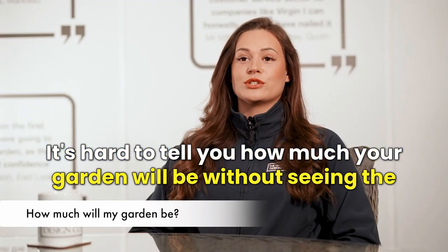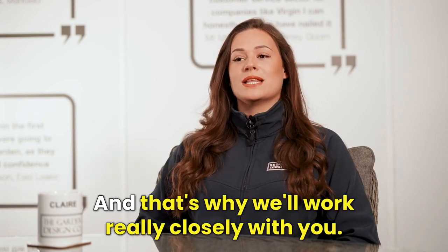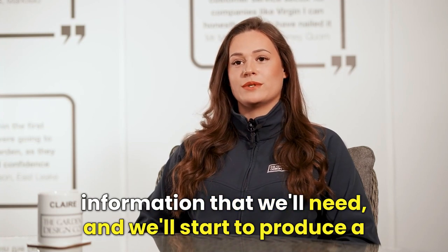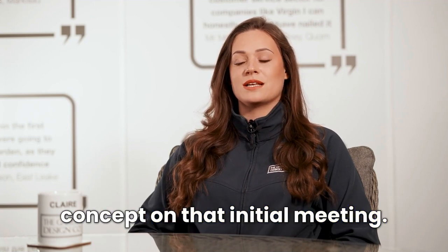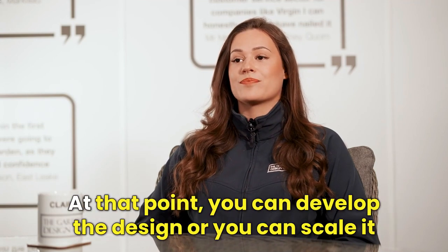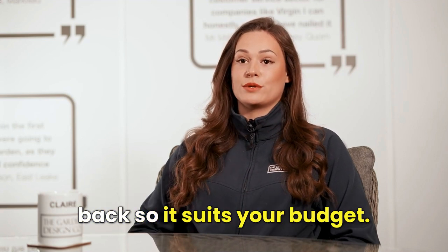It's hard to tell you how much your garden will be without seeing the project or knowing the design, and that's why we work really closely with you. When you have your garden survey, we'll have all the technical information that we'll need and we'll start to produce a concept. On that initial meeting, we'll give you a very rough feasibility so you have a bit of an indication of how much your garden will be. At that point, you can develop the design or you can scale it back so it suits your budget.